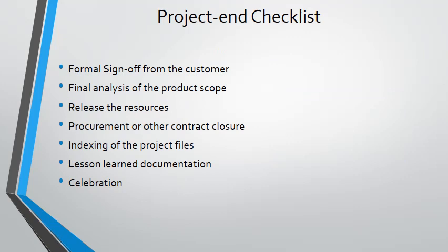Project closing is a phase that some project managers ignore, but it is as important as other phases. According to Pradip 2017, there are 7 steps to close a project, as we can see. After building the shed and having checked that I met all requirements, I met my neighbor to get the formal sign-off. Then I reviewed the project scope and I checked that everything was done according to it. Also, I gave all material left that I didn't use back to my neighbor.